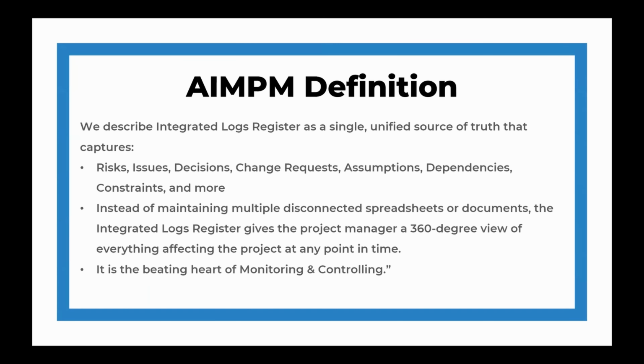Now, as I stated before, we define integrated logs and registers as a single unified source of truth that captures all of your risks, your issues, your decisions, your change requests, your assumptions, your dependencies, your constraints, and sometimes more. Instead of maintaining separate documents or spreadsheets, this register gives the project manager a 360-degree view of everything impacting the project at any point in time. It's very similar to the IPMP, where you're generating all of these different plans into one executable plan. This gathers all of your different tracking items, like tracking risks and issues and decisions, into one document.